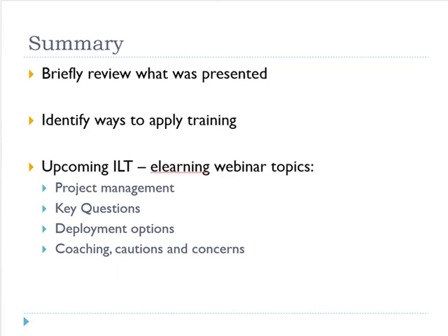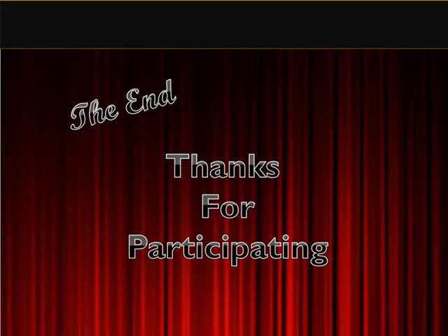And along those lines, do you have any tips for keeping SMEs dedicated through the project? Yeah. Actually, there's a great book that the ASTD organization has out there called SMEs from the Ground Up. And one of the things that book recommends is that you try to have a fairly vast list of SMEs on a project so as to not overtask any one person. Now, of course, that's going to vary on the level of depth of the knowledge that you're trying to convey.